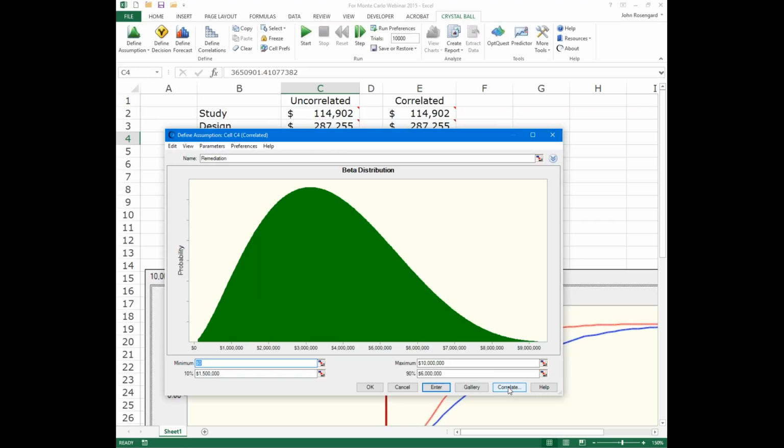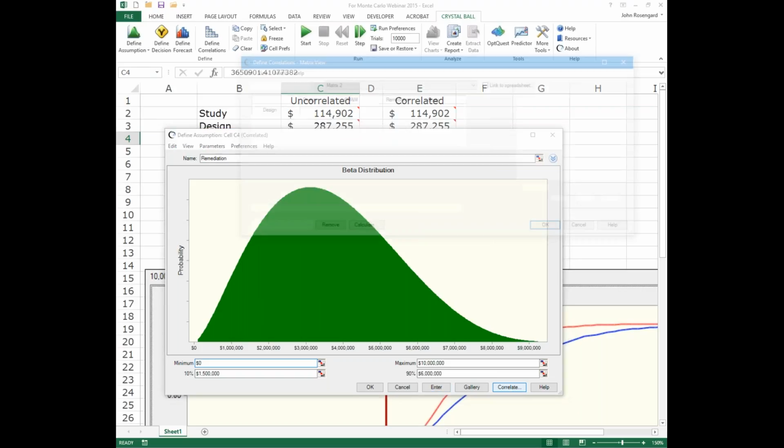In other words, if you run a model and say everything is behaving independently, every variable is uncorrelated, they're going to cancel each other out. So the expected value will be fine, but the range will be artificially truncated or narrowed versus what it would properly be determined as. So I include this correlation because, again, it's an easy one to skip.